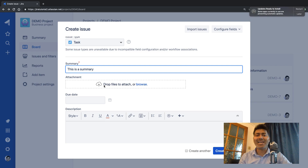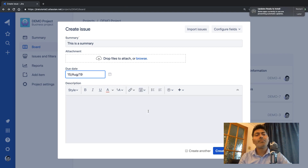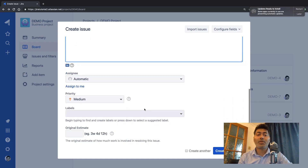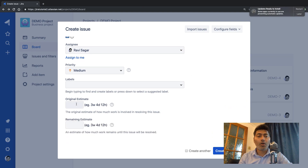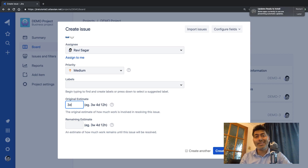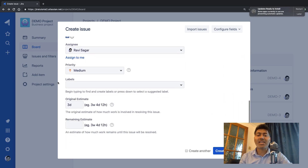You can fill up the fields if you want — there is an attachment field, a due date field so you can let your assignee know to finish the activity by, say, 15th of August. You can add a description and assign the ticket to yourself. The key field I wanted to show you is called Original Estimate. When you are planning your issues you can specify that this particular activity should take three days.